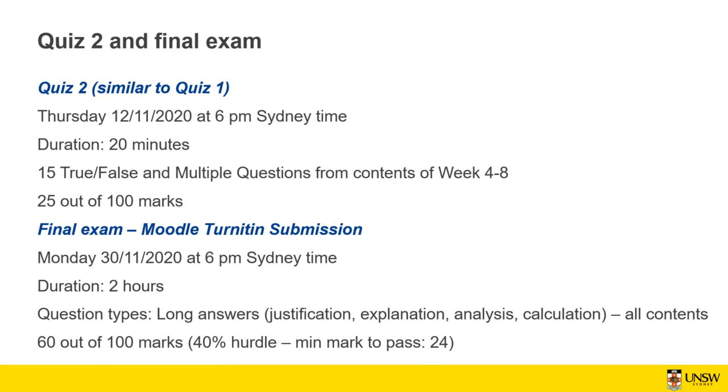But at each stage, let's say after the first 4 months, the planned value is just to finish the bathroom with 30K. So if after 4 months you haven't finished that bathroom, and only two-thirds of it is finished, then your earned value is two-thirds of that planned value. So two-thirds of 30K is going to be 20K.